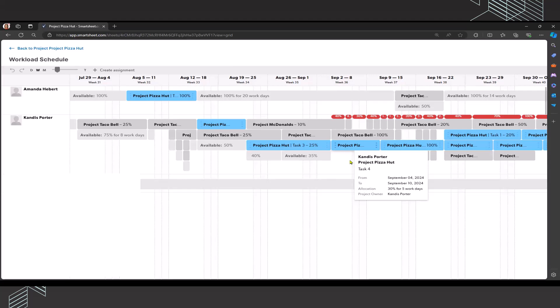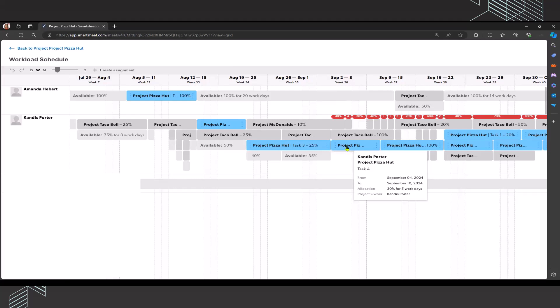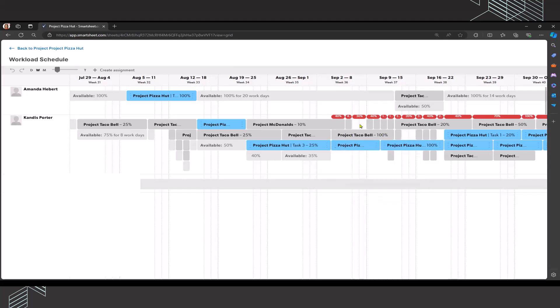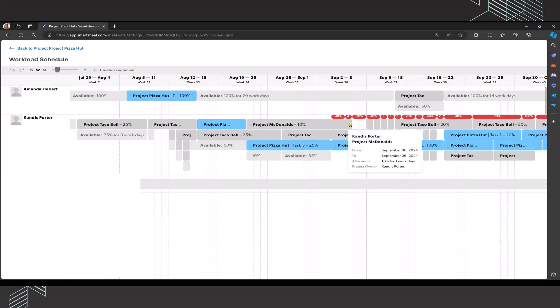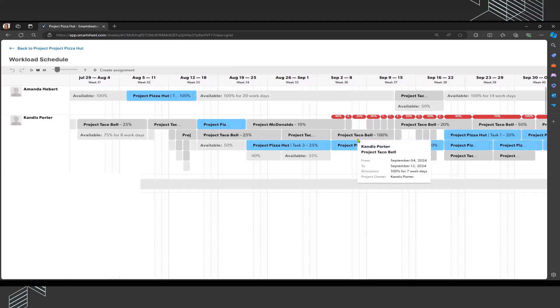However, if I dig into task four, it really does seem that that's a task that requires my specific skillset. So I'm not going to be able to reassign that to anyone. That tells me that I need to go into project Taco Bell and investigate and determine if I can reduce the percentage on the work associated with project McDonald's during that same time.